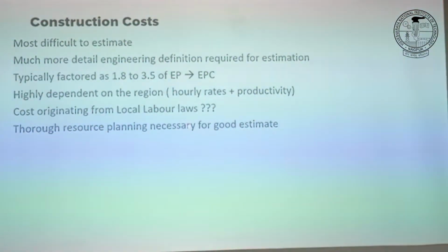So transporting 10 tons from point A to point B might cost you much higher in those European countries. Not because the driver doesn't want to drive, but the law prohibits. And hiring another one, so it's not just hourly rate. You can say you hired another driver, but the salary you pay is not only for the hourly work they perform, but also some fixed amount. So cost is always higher. So what I want to say here is your construction cost can be heavily influenced by local labor laws.